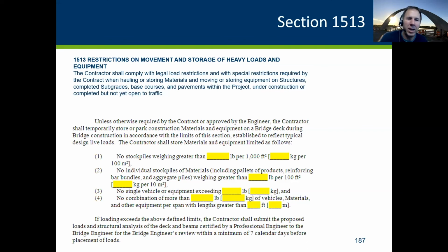And if you had any interpretation questions, please call us, because this is filled out by the design unit leader in preparing the plan. And there is a lot of times misunderstanding on the intent and what they actually put down, to be honest. But the first line is basically a localized area. Say you've got girders and you've got floor beams, and the smallest element supporting the deck might be a stringer. So that would be a local pile of aggregate on the bridge. And we don't want to have these concentrated loads that might overstress that local element.